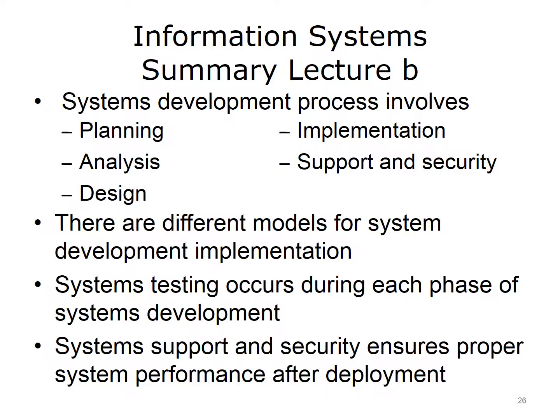This concludes Lecture B of Information Systems. In summary, the systems development process includes several activities such as planning, analysis, design, implementation, support, and security. There are different models for how this process is implemented. For example, the Waterfall model executes each activity completely before continuing to the next activity. Other models, such as the Spiral model, allow for more incremental feedback and iterative development between phases. Testing is part of all phases of the systems development process — initial plans and designs are tested, as well as the system itself once it is implemented. Testing occurs at the unit level, where units are small parts of the system, and on the system as a whole. Systems support and security ensures that the system is used effectively and securely once it is implemented.